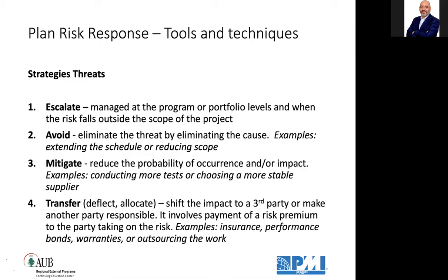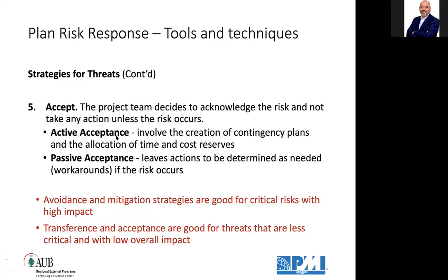Warranties are transferring. يعني by having a warranty you are transferring the risk, or outsourcing the work. When you outsource the work, you are transferring the risk of potential low quality deliverables to someone who you are outsourcing the work to. And you can accept the risks.